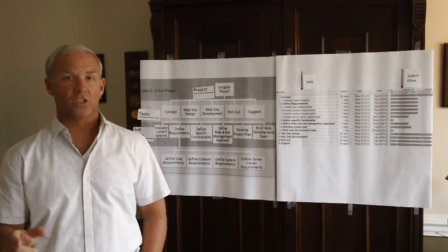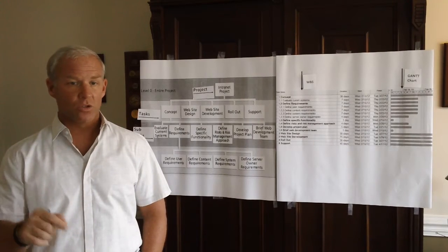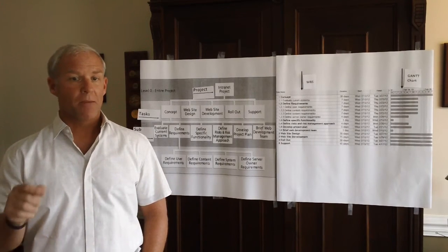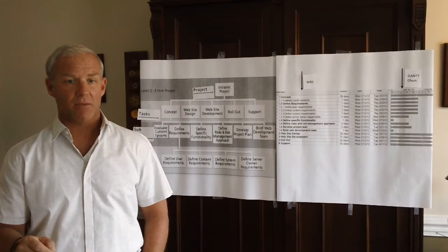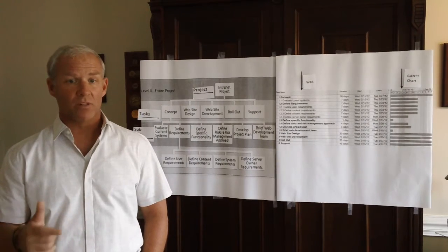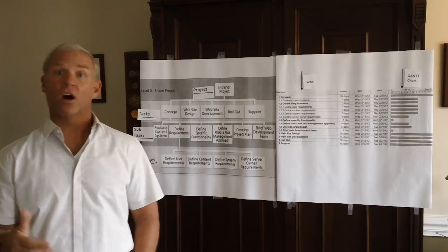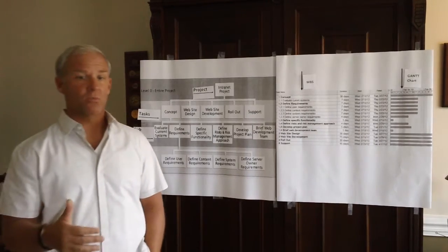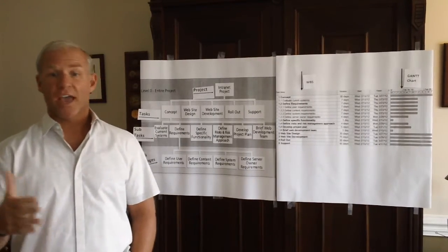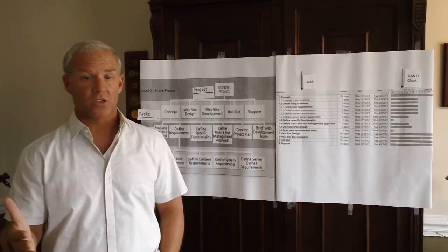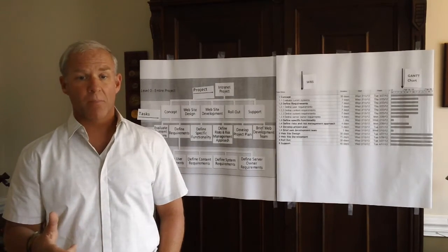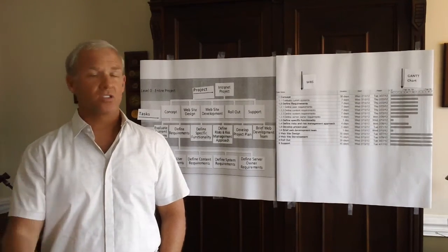To close, remember, whenever you set up a project work breakdown structure, think about how you'll be using it later in the project. Design the WBS to include the team schedule and managerial assignments at the same time. The schedule and timeline will likely be formatted along the structure of the WBS. So this would be the structure for estimating costs and tracking earned value performance. This would definitely help the PM to track the costs and the progress of each manager.